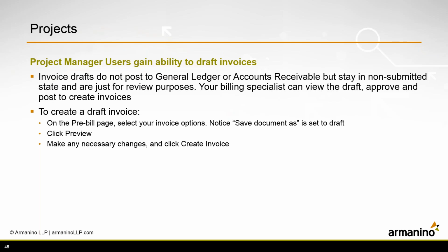So the project manager can generate the invoice in the draft state, and then the billing specialist or some other financial user can go in and review the draft, approve it, and then actually post the invoice.